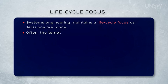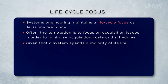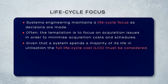It's proper for project managers and their teams to focus on acquisition — their role — and we want to make sure that we meet the stakeholder requirements minimising cost and schedule. But a lack of consideration of whole-of-life issues can often lead to larger-than-expected costs during utilisation, met from budgets that are generally inappropriate and insufficient to keep the system in service. A lifecycle focus requires us to focus on the entire capability over its entire lifecycle, not just the product during acquisition — the result being a focus on lifecycle costs, or whole-of-life costs, sometimes called the cost of ownership.